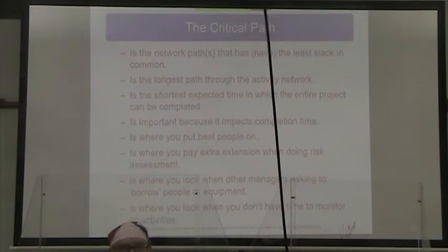And it defines the shortest time in which the project can be completed. Obviously, it impacts our completion time, right? If it's the shortest pathway, that means that we have to stay on that and manage that like nobody's business to make our completion time come out right. So, as a consequence, we usually have our best people working that part.